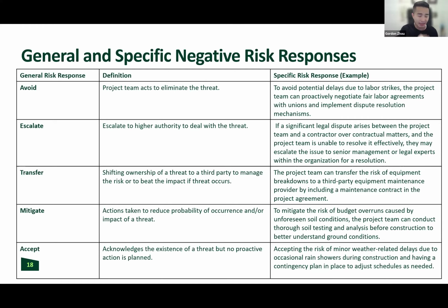Okay. Escalate. You may say, you know what, I'm going to escalate a risk. So let's just say, for example, I work at Transit. Many of you may work in your organizations. And one of the things that always happens is, oh my gosh, I may not have enough money, right? I may not have enough funding because projects always run out of money. For me at Transit, that happens. And so I may say, for that risk, if I run out of money, I'm going to escalate. What that means is I'm going to escalate to someone that has more power or more influence than me to deal with this threat, to deal with this risk.